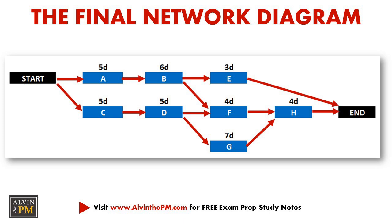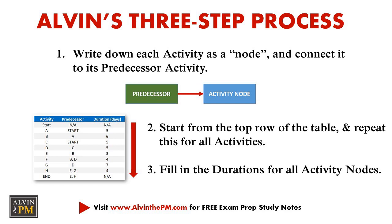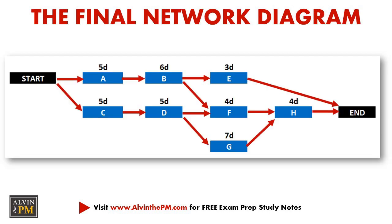Make sure you use my three-step process to help simplify things when you encounter these types of questions on your exam. First, start out by writing down each activity as a node or a box, and identify and connect it to activities which occur before it — what's known as the predecessor activity. Rinse and repeat this for all of the other activities. And lastly, fill in the durations for all of the nodes. With that completed, you'll have a final network diagram.